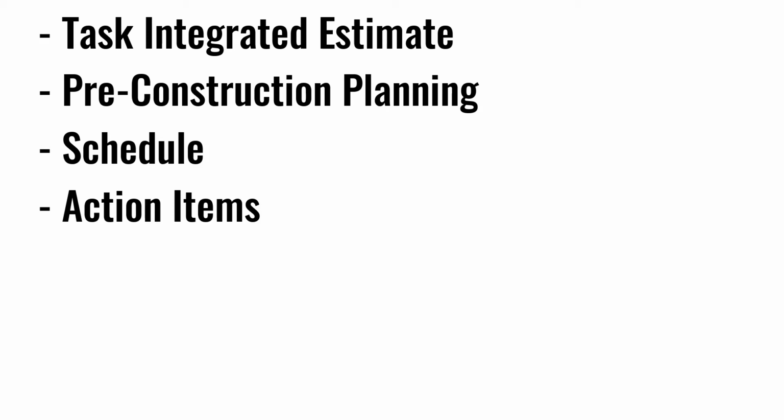So he can apply pressure to the people in the field to get that taken care of before that set of tasks begin. From there, in my case, since I built proprietary software to make all of this happen and flow well, it's just a matter of point and click on that master schedule task for task and assigning them to either individual workers or crews of workers. And then through time tracking, tracking their progress against the estimated hours, so that on a daily basis I know in relation to the estimate how well I'm performing. And if I see problems along the way, I can react quickly to get out there and solve those problems before they have big impacts on the profitability of my project.